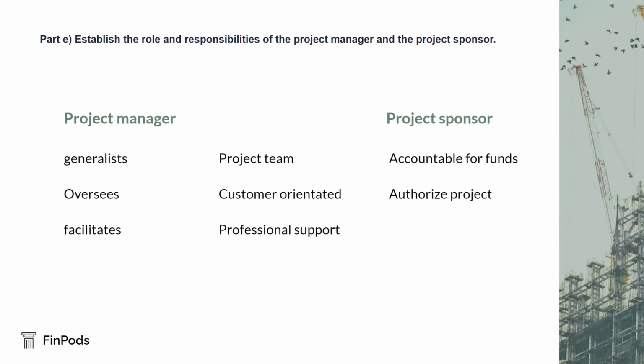The project sponsor will not be involved in the management of the project and may not have the capacity to provide effective supervision for the project manager. Under these circumstances, the project sponsor may appoint a project owner, whose role will be to review project plans and progress at regular intervals and to arbitrate on any conflicts that may arise between project and line management. Of course, in smaller organisations, the roles of project sponsor and project owner may be combined.